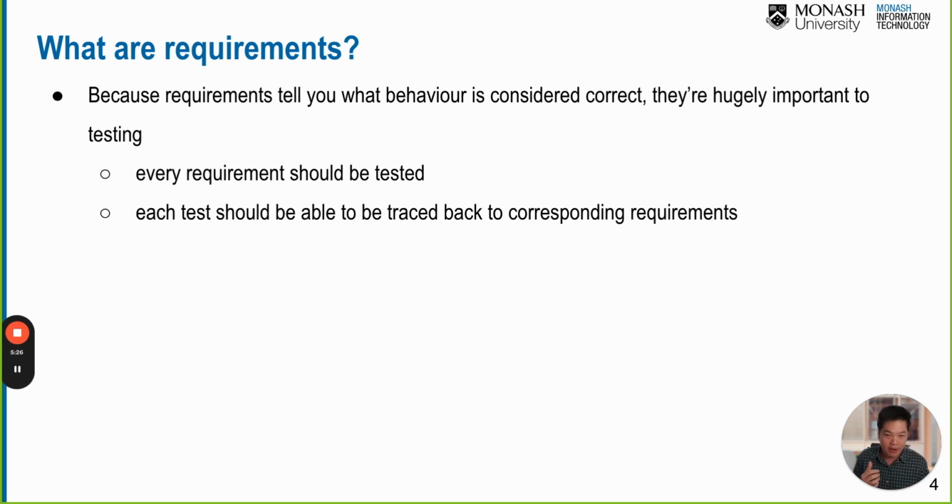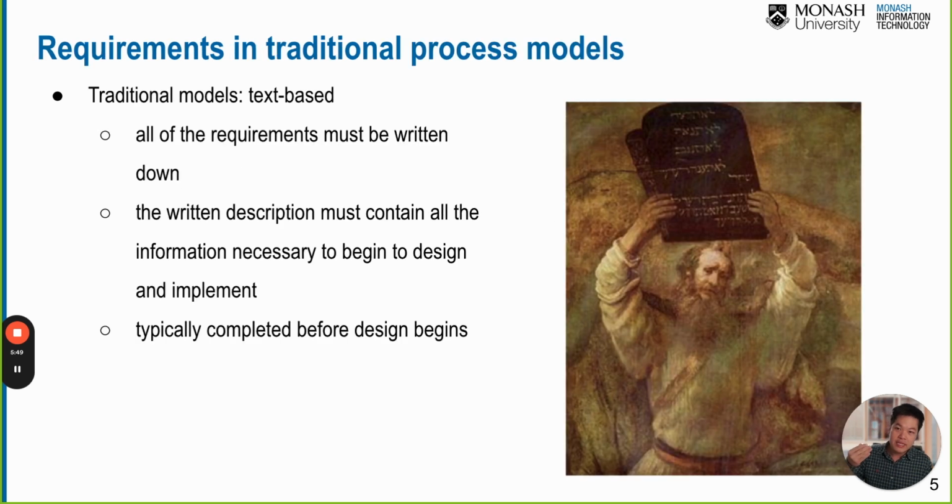Every iteration, make it really clear as much as possible so that the development team can actually develop it, right? And how can we ensure that the requirement is actually met? That's why each of the requirements must be tested. And we'll talk about the definition of done in a later slide as well. So basically, we need the requirement, and each requirement needs to be tested, and then we can consider that requirement actually done.